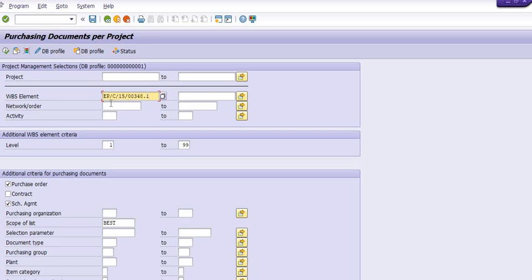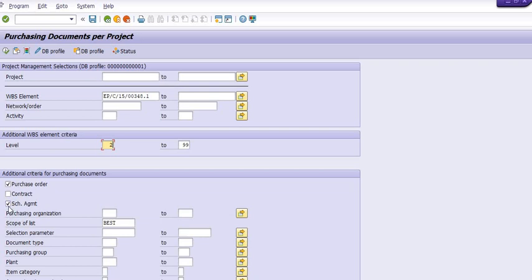For level, I have chosen level 2 to 99 because level 1 indicates the project and level 2 indicates the WBS number. Here we have three options: purchase order, contract, and schedule agreement. I am focusing only on purchase order numbers.